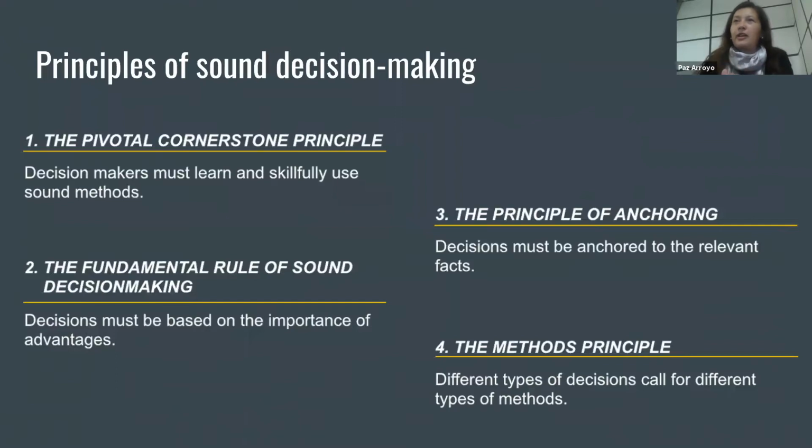It's more a conversation, and the scales are really used to represent the importance of the advantages. And there are several ways of doing it. You can use Post-it notes and discuss them and move them up and down. If you're with a group of people, you can use a scale, and the first one that you have to decide is the paramount advantage, and then you start to compare against that. So it's an ongoing comparison and conversation process going on.